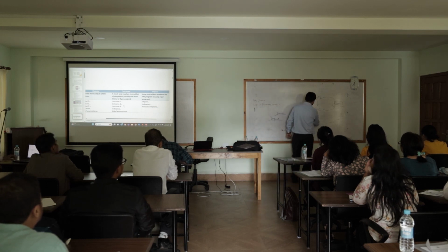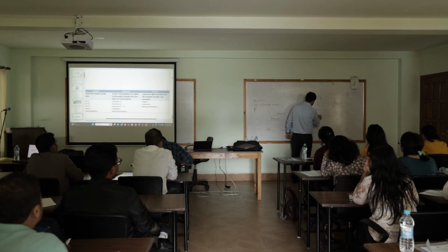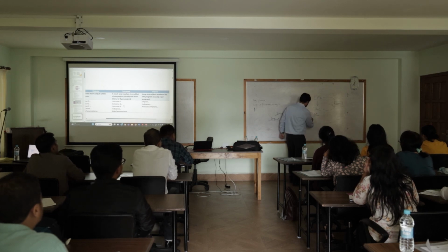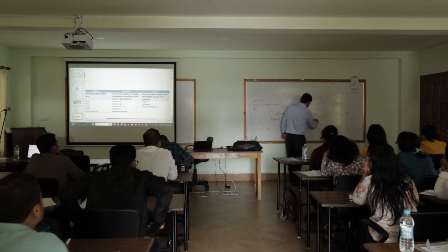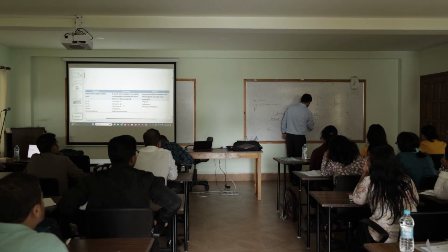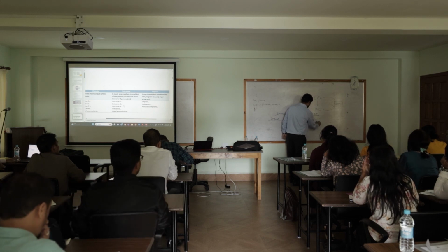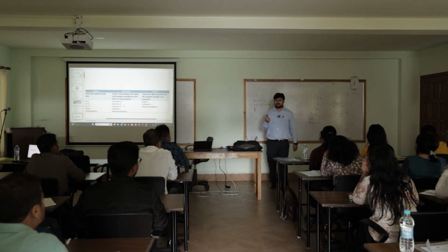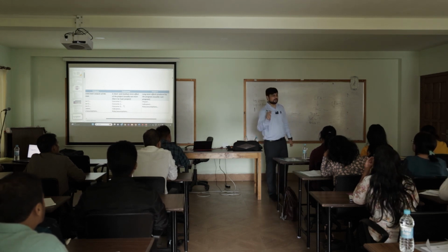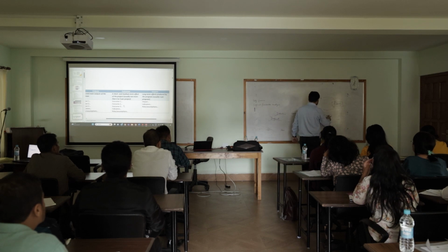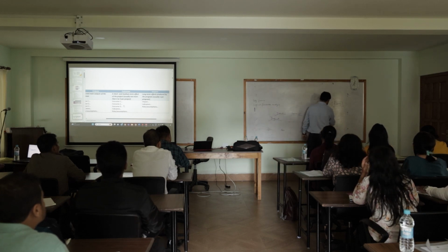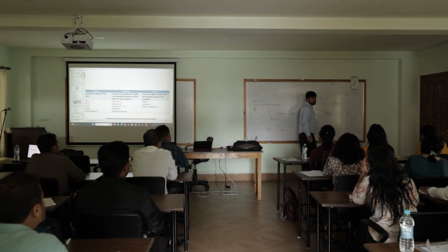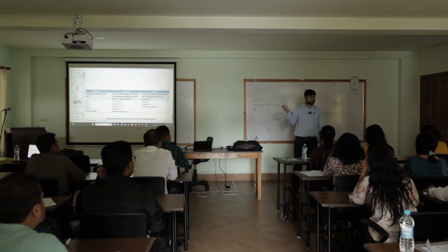Then it will also have a target in place. The target would say 30% in first year, 50% in second year, and so on and so forth. Or it could be simply one target, 30% by the end of the project. And then you also have a means of verification. So it has the best of both worlds.